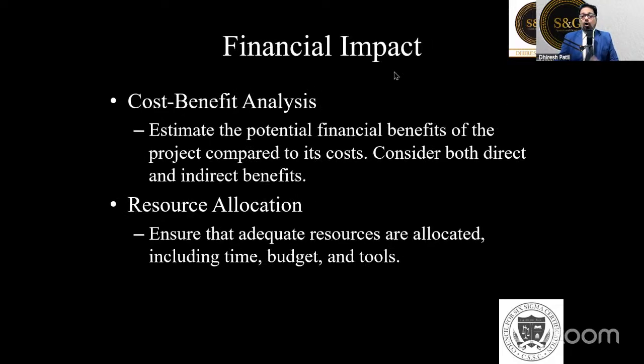Financial impact. Always select the highest financial impact projects, because understand this, we are doing Lean Six Sigma and putting in a lot of resources. Maybe we are hiring trainers and consultants from outside. So we should always prioritize the project with the highest financial impact. Do the potential cost-benefit analysis and prioritize those areas which will have the highest impact. Then you can calculate the return on investment. Let's say I invested 10 lakh rupees and I got 1 crore rupees. So it is a 10x return on investment.